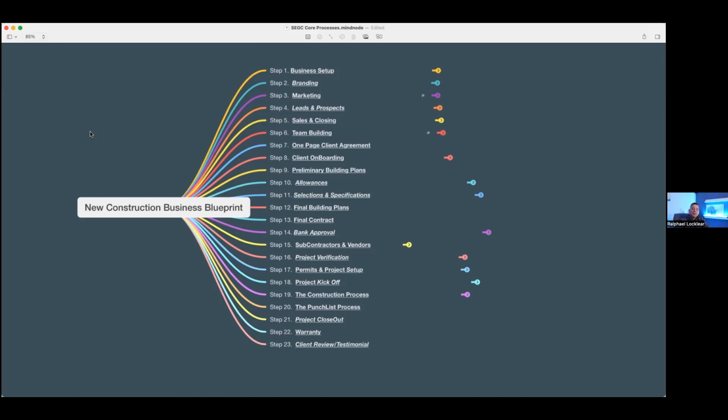We go over the same things we discussed with them initially when we onboarded them in our office, our process of checking in at our job sites, letting us know that they're on our job site. They send a video showing that they've counted the materials that are on the job site, so we know they've got the materials that they need. As they're working, they're sending us progress and video updates throughout the day to our group so we can track the progress.